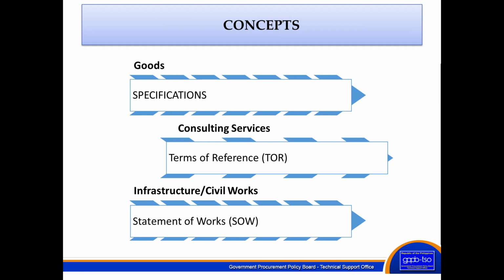Similarly for infrastructure or civil works, we have the statement of works, wherein all the specifications, the quantities or the coverage and the scope should be clearly defined.